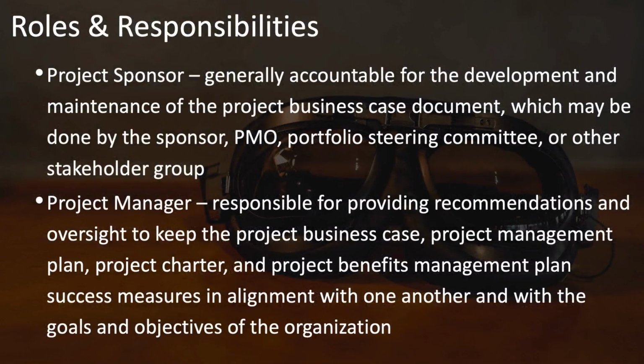Who develops and is responsible for the needs assessment and the project business case? The project sponsor is generally accountable for the development and the maintenance of the project business case document, which may be done by the sponsor, or it may be done by the PMO, or the portfolio, or the program, or some other stakeholder group.